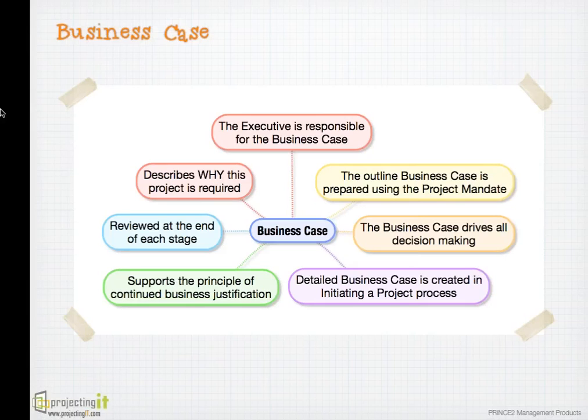Let's talk about business case. Business case is prepared by the executive or the project manager. Business case describes the reasons behind undertaking the project. Business case also tells what solution will be delivered by the project and the cost and timelines required for delivering that solution.